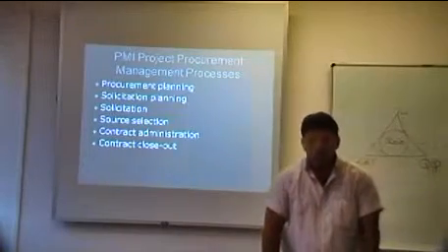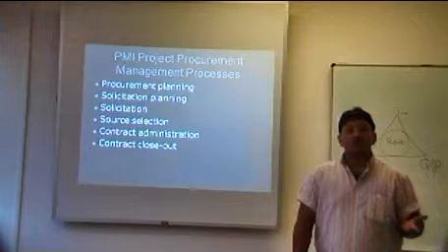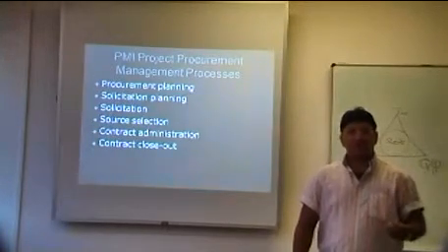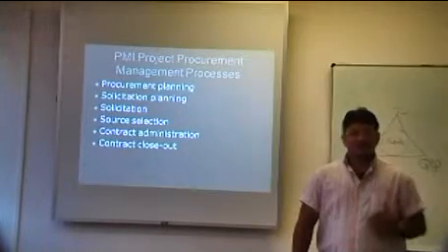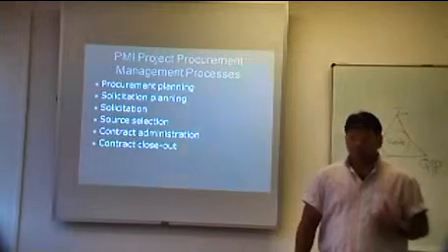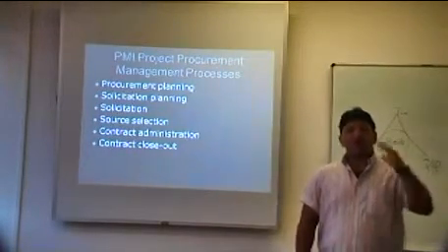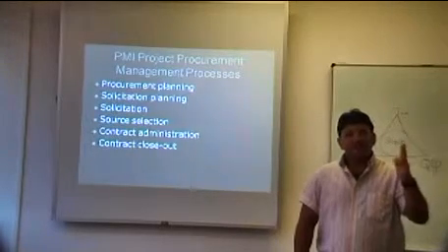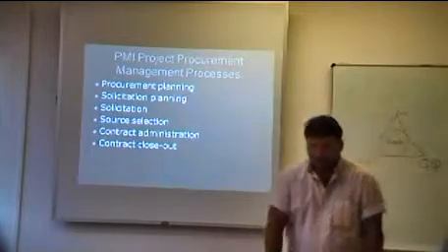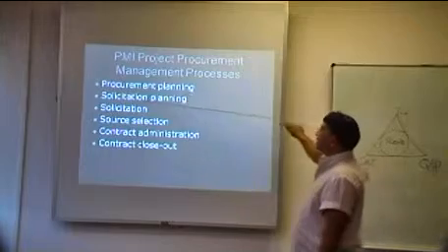And then you also have to look at your procurement strategy. If I talk about the procurement strategy, I mean your contract strategy. From your contract strategy, you have to look at the form and type of contract, which is extremely important based on the nature, the content and the complexity of the project at hand. So procurement planning is all about that.